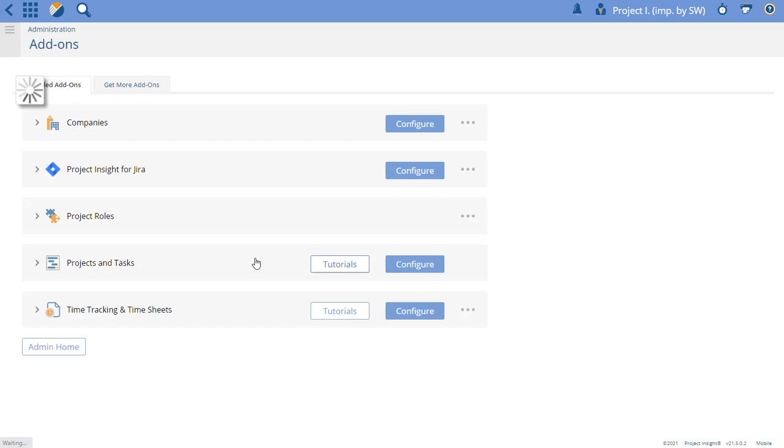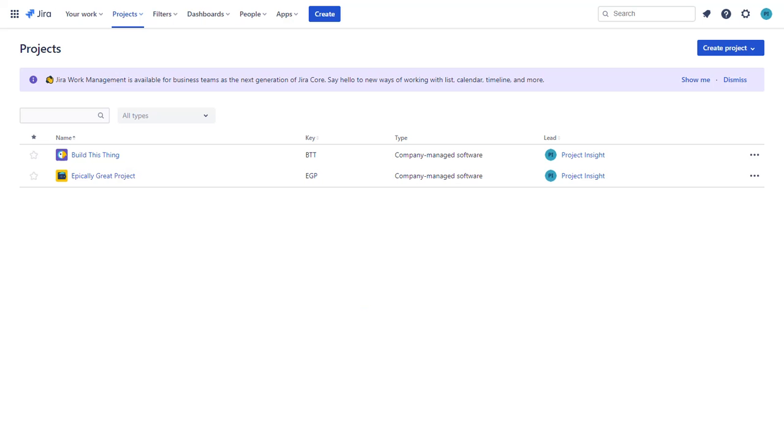I now have the ability to connect to multiple Epics. A project in Project Insight connects to an Epic in Jira.